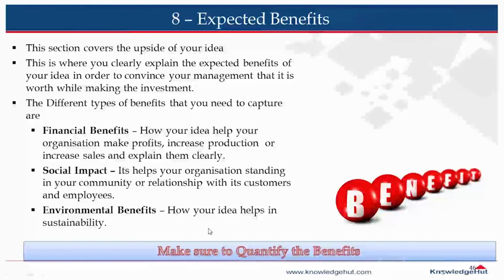In our business case example, we have a section which says the cost benefit analysis, and which clearly shows that you're investing so much at the beginning of the year, and at the end of the first year, this is what you gain. At the end of the second year, this is what you gain. So it clearly says you can compare two options and see when you gain from the third option over a period of time. So we will see some examples of that.